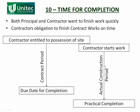In actuality, the actual contract period is when the contractor starts the work, and it finishes when the practical completion certificate is issued. Hopefully these coincide with each other — if they do, that's fine. But the contract period is the obligation the contractor must meet, not the actual construction period.